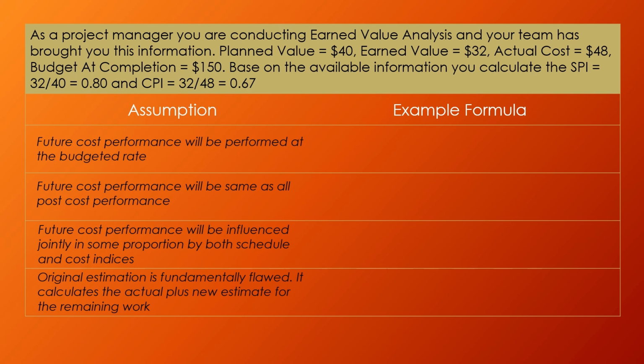Given the similarity between these two terms, they are frequently used interchangeably. Since they are so often misunderstood, it is critical to understand the differences and when to compute for which of the variables. Total expenditures are predicted by the estimate at completion, whereas the amount of money required to finish the project is predicted by the estimate to complete, or ETC.